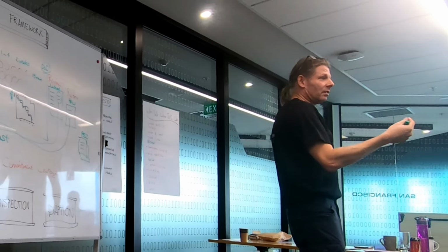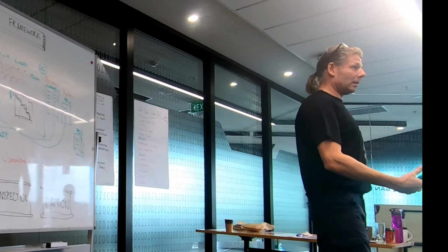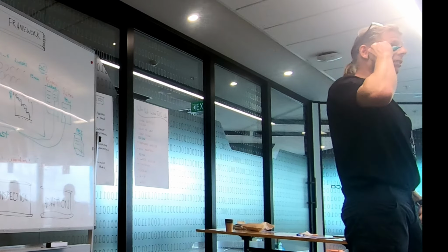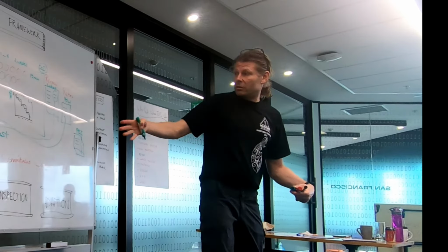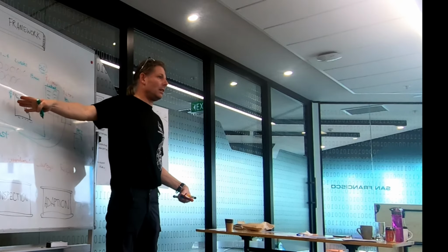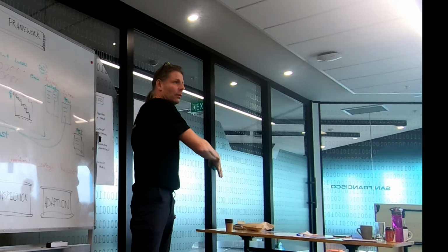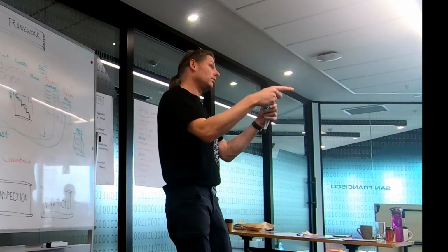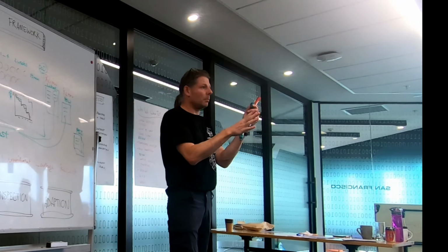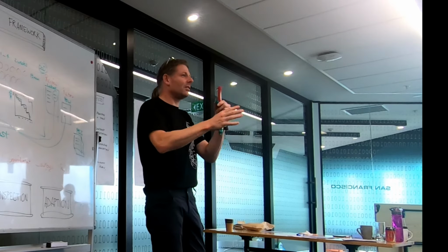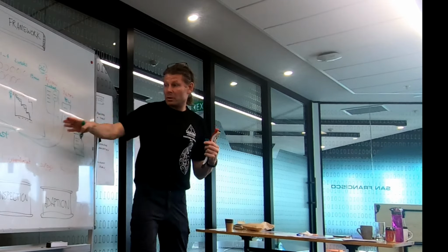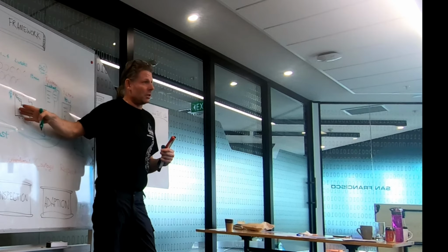So the reason I use hours is as an aid for planning, because it gets you thinking. You think, oh no, we forgot about this. But also, it's a sanity check. Is it really a 5? Because it's 50 hours. This 8 over here is only 40 hours. Do you really think it's... So you can do some rough guesstimating. I'm not saying points equals hours, but it can just cross-check in your mind. But the other thing is it helps you create this burn down chart.